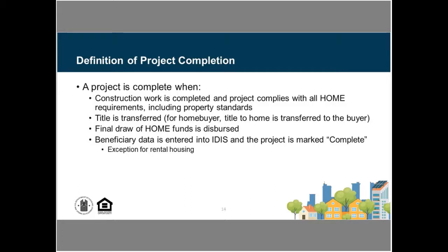It's not just that construction has been completed, but that the actual activity of selling the unit will have been completed, and that's going to be evidenced by the fact that the title has actually transferred to the home buyer for that project. Also need to make sure that the final draw for the home funds has been disbursed.